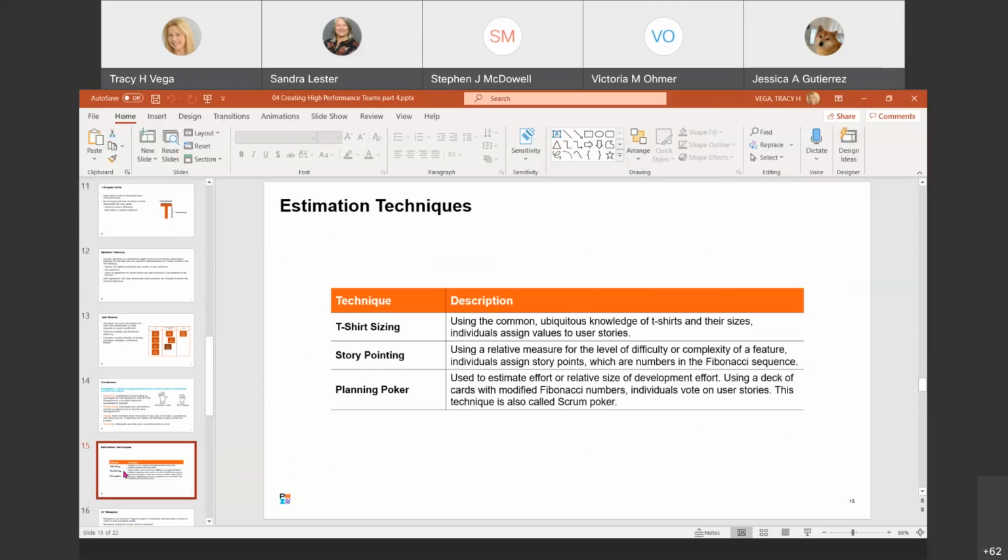A couple of the methods that they use are T-shirt Sizing, obviously, small to XXL, just like it says, to determine which one is the most important. And this other one, if I get it right, is the modified Fibonacci sequence. They have that on there, which is 1, 2, 3, 5, 8, 13. It's often referred to as story points. They're unitless and attempt to capture the overall impact of the work as they're going through it. So that's what that is.